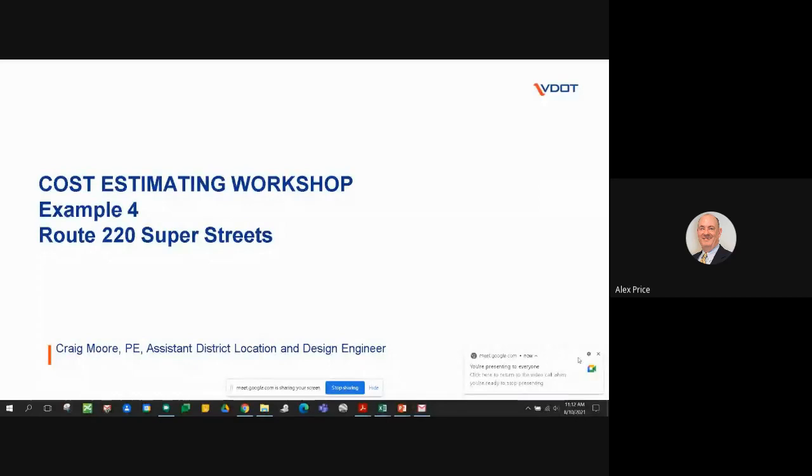One thing that Adam had mentioned, the impacts that need to be considered once the job goes to advertisement. The contingencies chart doesn't stop at PAC. It continues on and gives some contingencies when we're advertising our projects, and that's because our bidding climate is always changing.